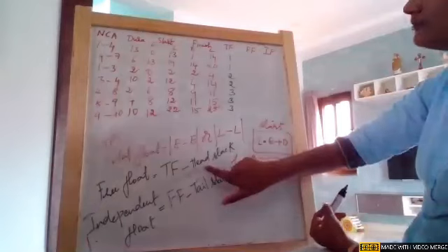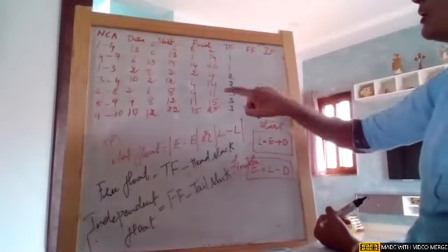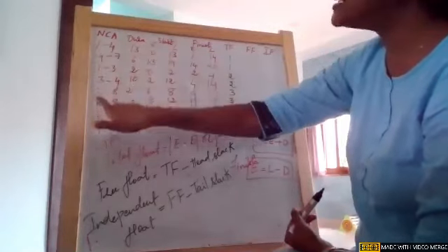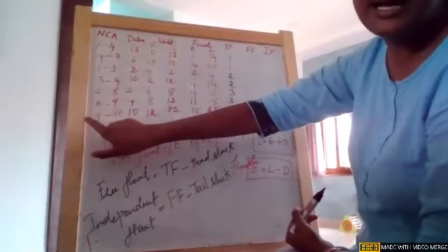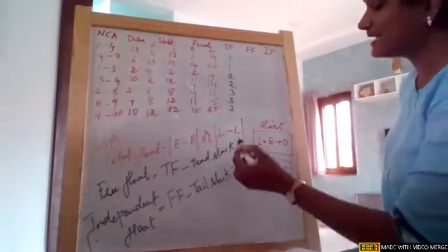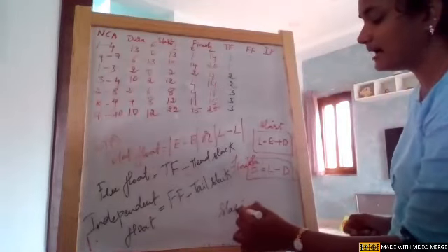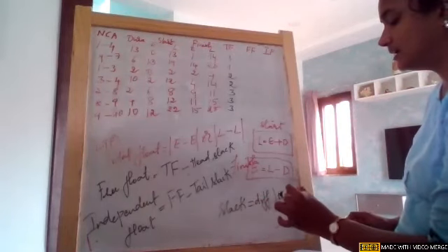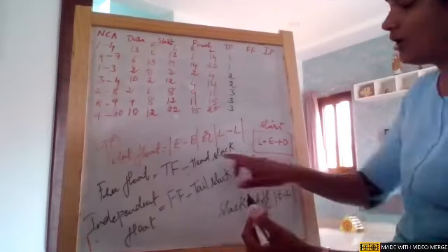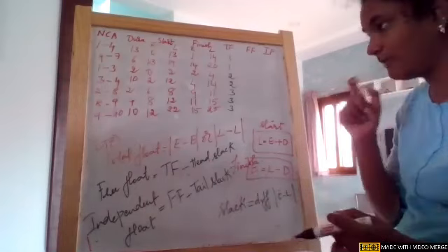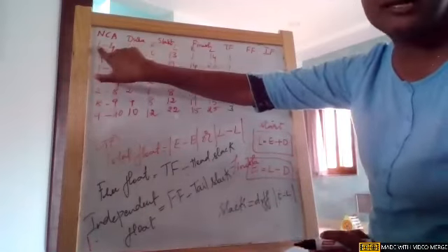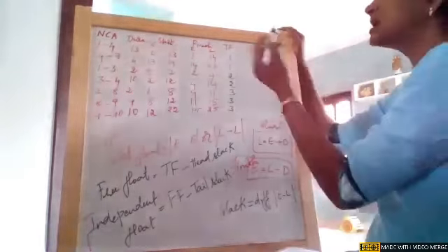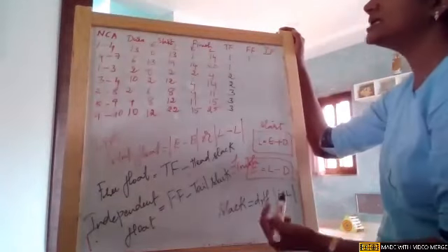Now the little confusing part is, what is this head slack? Total float anyhow I have. Head means obviously, what did I tell? All these starting elements are heads. On those nodes, slack is nothing but the difference of earliest minus latest on the head. If I go back, on 1, we have 0 and 0. Earliest and latest times on node 1 are 0 and 0. So the difference is 0. So 1 minus 0, it is 1.